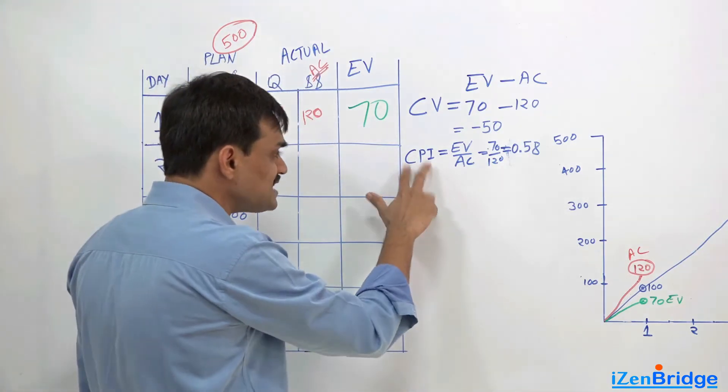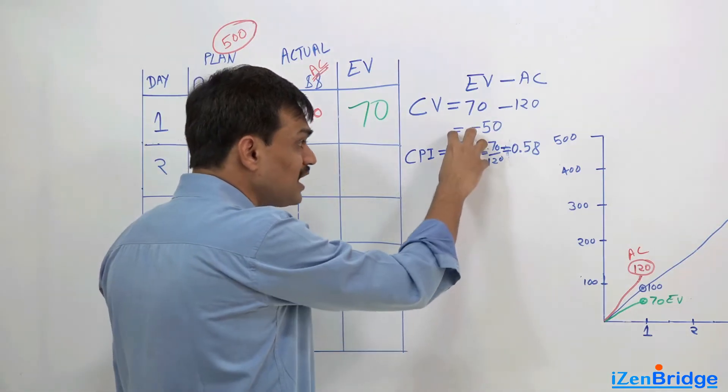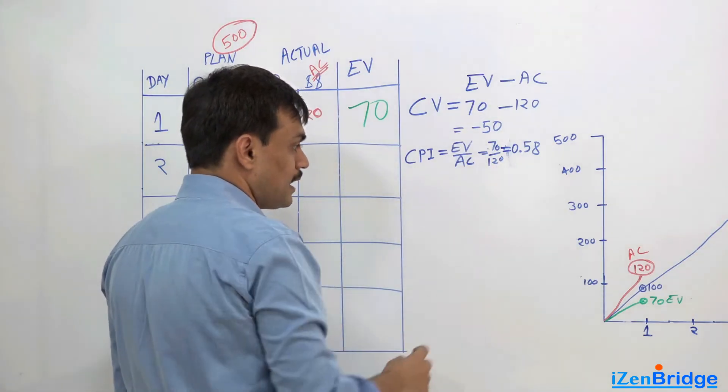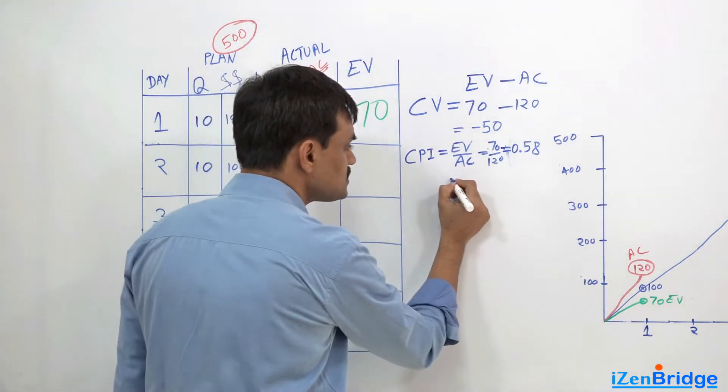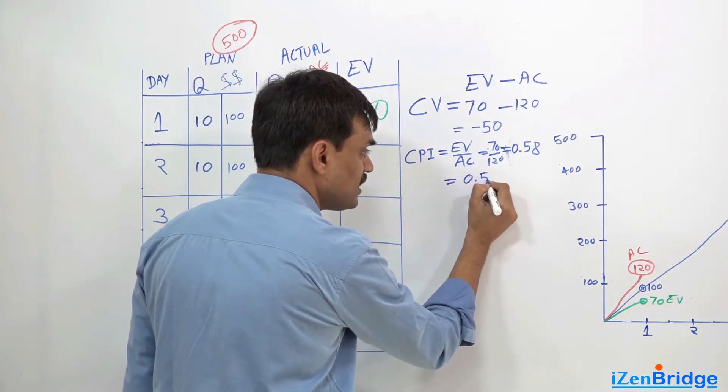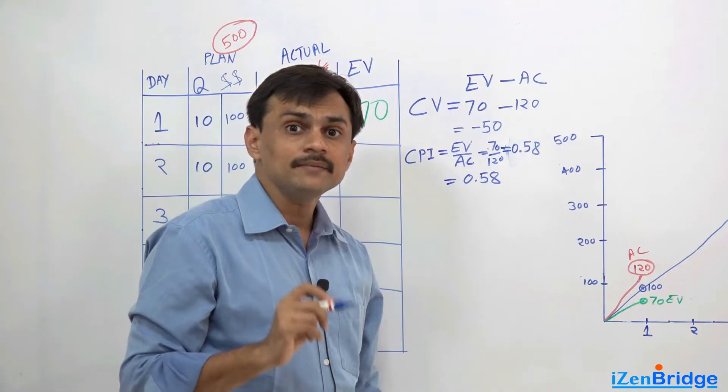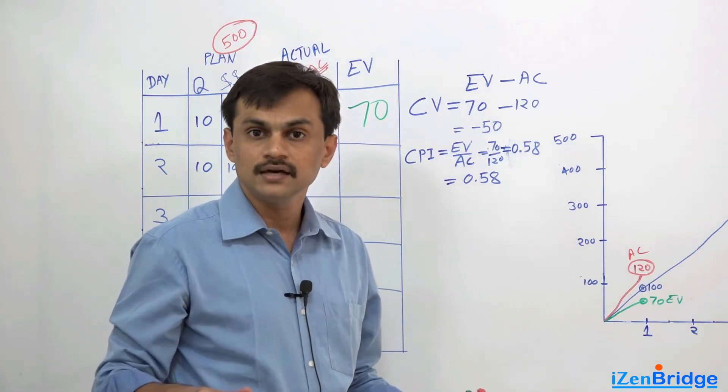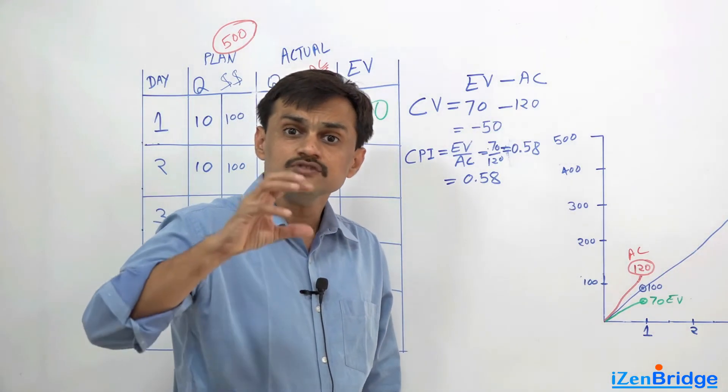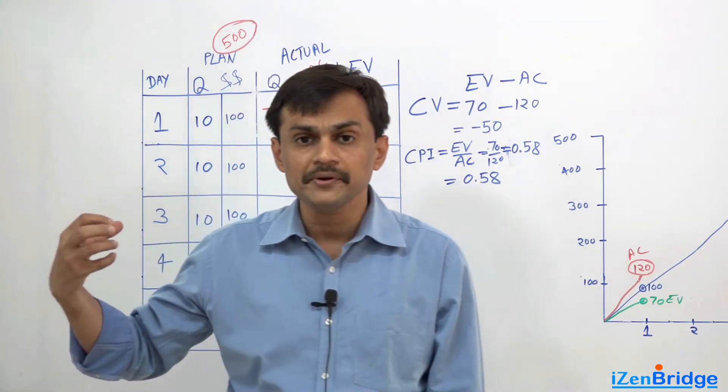So when the CPI, the cost performance index, shows that we are earning against spending, and if my cost performance index is telling me 0.58, it means I am spending $1 and I am getting value of 58 cents. That is it. It is like my performance is 42 percent behind, more or less.